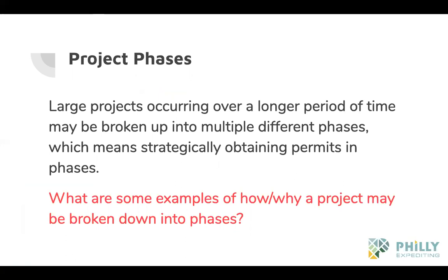Right. Exactly. But usually we'll ask the client, hey, just let you know, you can do all this in one shot, but that means you have to get your surveyor to draw up the lot line relocation survey plans, and then you got to get a design professional to do the design and architectural plans, and it's at least a 4-month process to go through the lot line relocation, and then probably another 2 or 3 to do the other one.